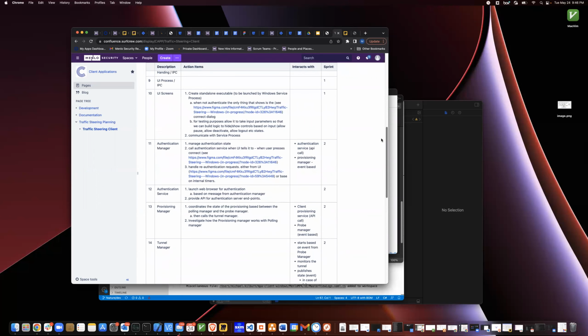So when we provided the timeline to build the application on Windows and Mac, we based it on our architecture at that time, and we provided about 6 months for the client side, including the Windows and Mac applications.